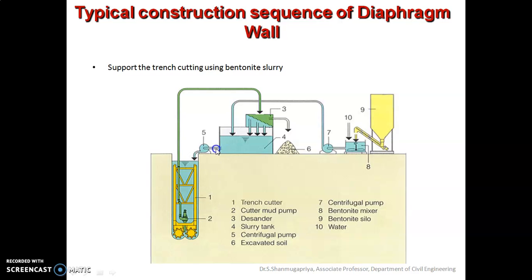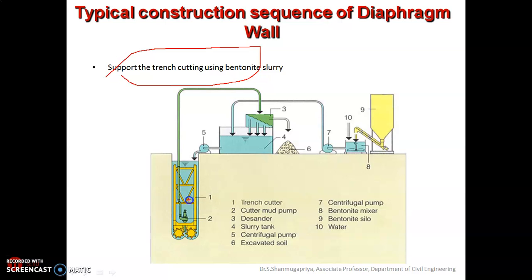The third step is to support the trench cutting using bentonite slurry. During excavation, you pour the bentonite slurry, which gives stability to the soil and prevents the collapse of the soil during excavation. Bentonite slurry is a type of clay mixed with potable water. Pouring the bentonite slurry makes it easier to carry out the excavation process. In this picture you can also see the bentonite plant.